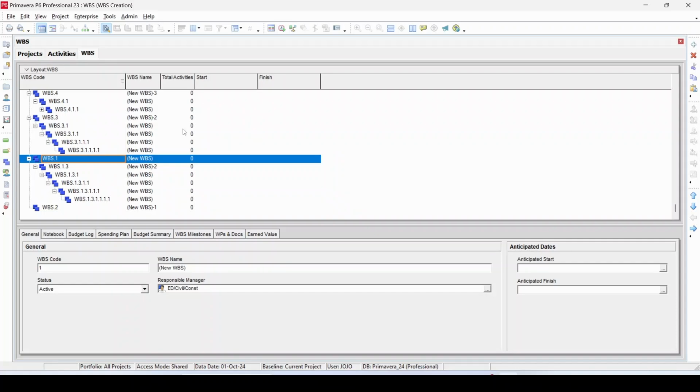In this regard, it is also stated that you can create or modify WBS within the WBS window only. You cannot do this in the activity window, though the created WBS will be seen through the activity window also. To see it, jump into the activity window.